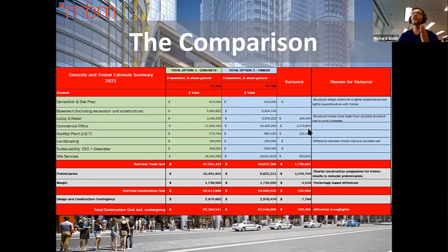And it has to be said, this premium that we were seeing in the tender returns for the office and the timber construction of it, there was a lot that we could do there. Certainly I felt we could sit down with the builders and negotiate and take some of the risk out of that, because there was risk in there simply because of the current position for timber, and the fact that this thing is currently going to be built later on in the year.